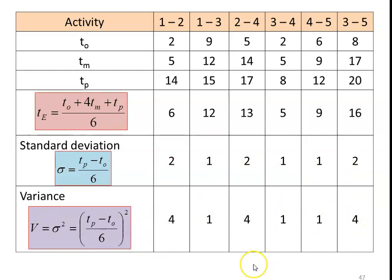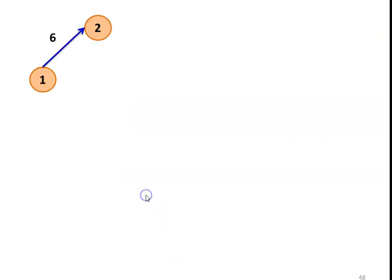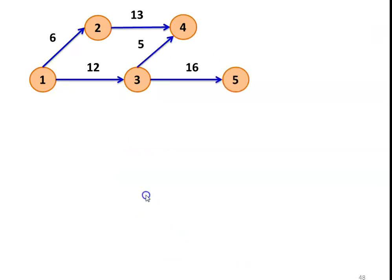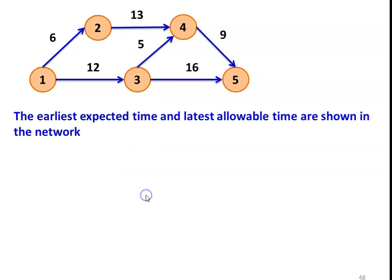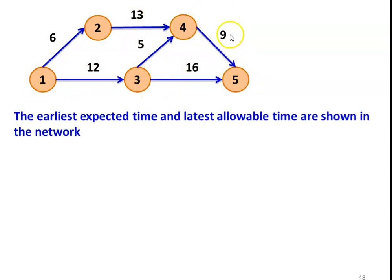These are all the various computations of the PERT network. Now we draw the network with all the TE values calculated: 1 to 2 is 6 days, 2 to 4 is 13 days, 1 to 3 is 12 days, 3 to 4 is 5 days, 3 to 5 is 16 days, and 4 to 5 is 9 days.